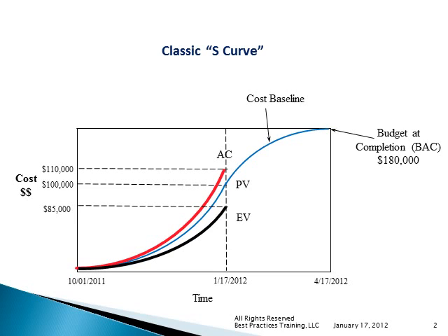So once we've got all these four variables determined at this point in time, then we can just plug these values into the different earned value equations and come up with some very interesting computations of variance. We can calculate in earned value terms schedule variance, cost variance. We can plug them into the performance indices, schedule performance index, cost performance index. We can do calculations of forecasts, estimate at completion, where we think, based on our performance to date, we're likely to end up for the project at the end, and calculate how much more work we have, the value of the work that's left to be done, estimate to complete.